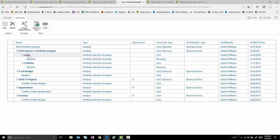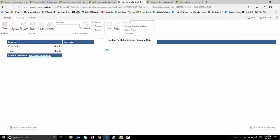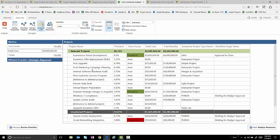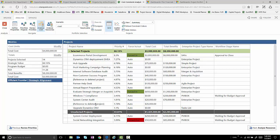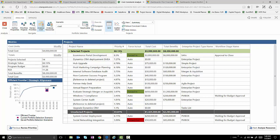So for example, if we use these capabilities, we can start looking at efficient frontier modeling and being able to look at cost constraints and saying, given, say in this case, a $4 million constraint, how many of the potential projects and what value can we get out of this potential portfolio? Given this dollar constraint, we can only do 66.3% of the value of this portfolio, according to the efficient frontier modeling. And we can force in and force out projects and do those types of things that Project Online allows us to do. But we can do it within the context of managing this within Dynamics 365.